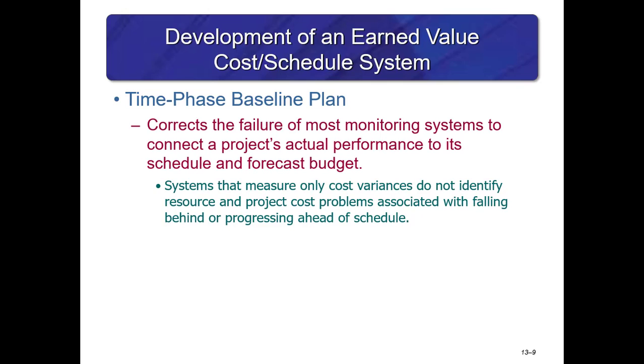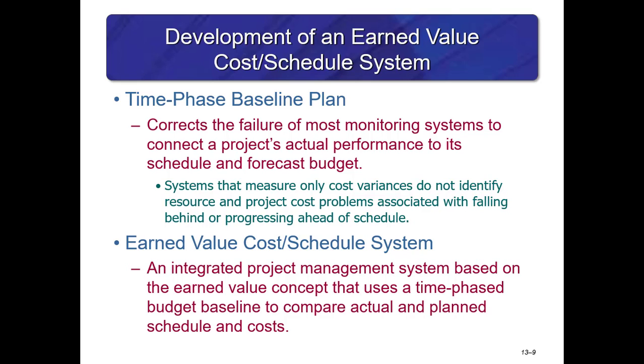To develop an earned value cost schedule system, you must have a time-phased baseline plan. It corrects the failure of most monitoring systems to connect the project's actual performance to its schedule and forecast budget. Systems that measure only cost variances do not identify resource and project cost problems associated with falling behind or progressing ahead of schedule. So the earned value cost schedule system is an integrated project management system based on the earned value concept that uses a time-phased budget baseline to compare actual and planned schedule and cost.